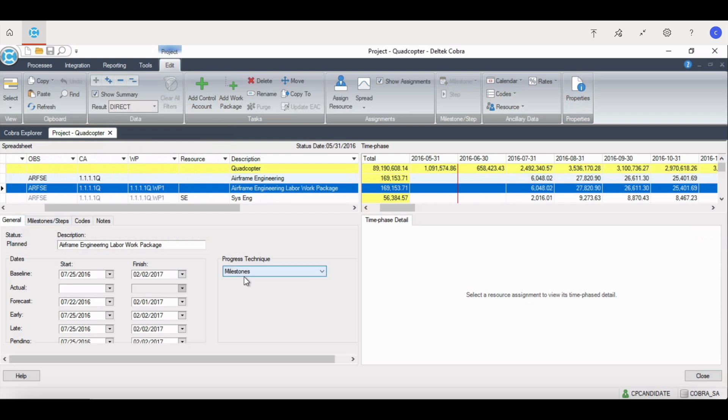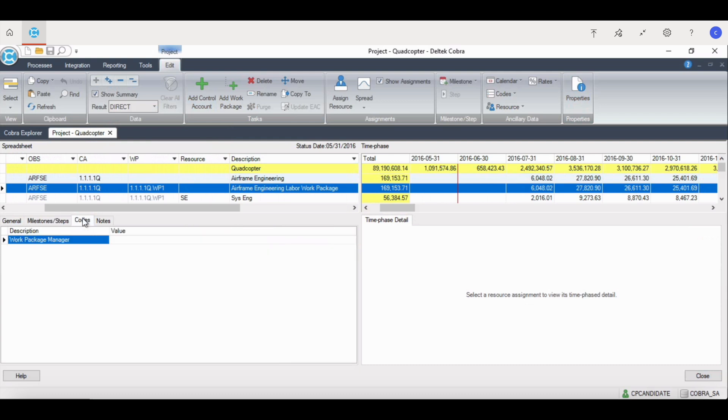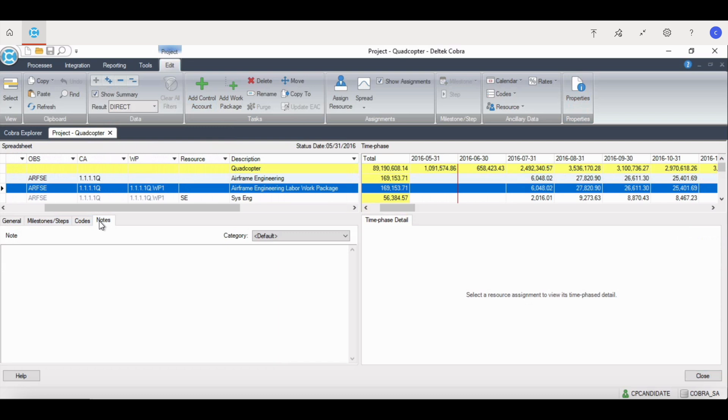If the work package progress technique has milestones or steps, you'll see those listed here. Any codes for the work package or control account will also be listed here. And then notes for the work package or control account. Anyone that has access to your project will be able to see those notes.